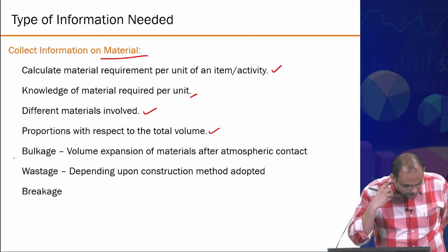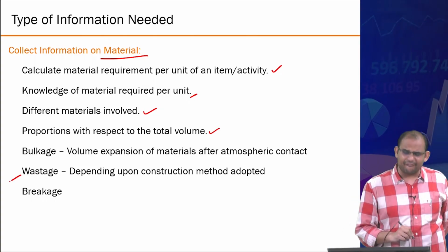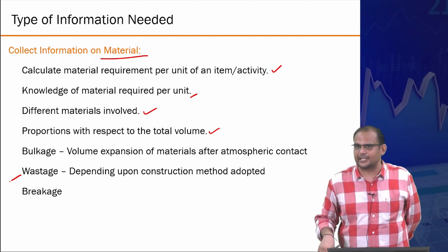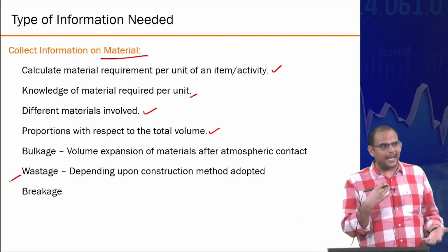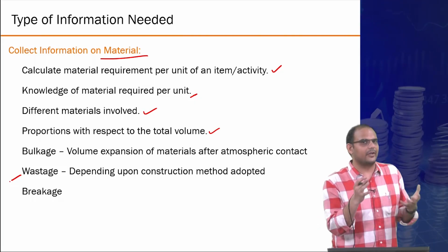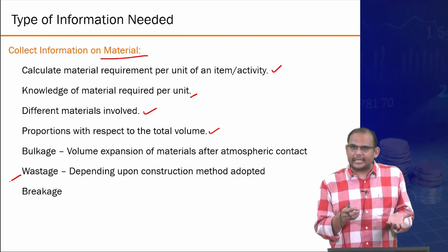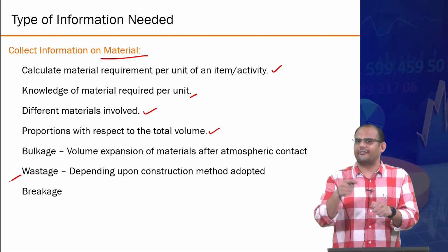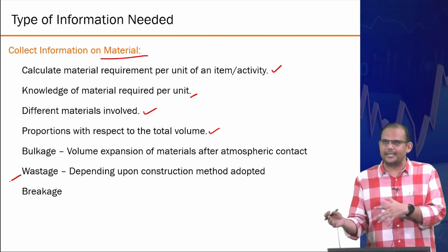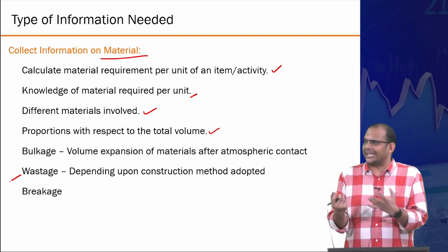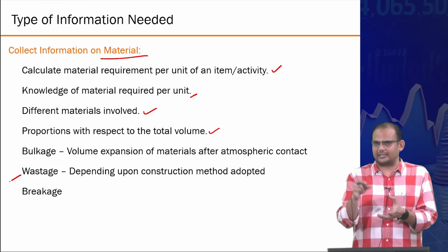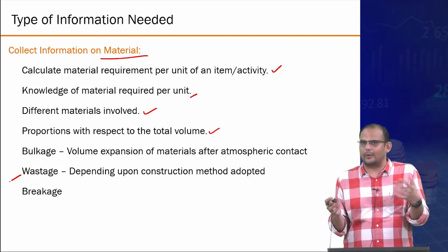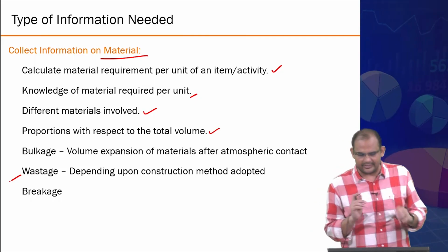There's also a problem of wastage. Not all 100% efficiency in material usage is there, because typically when you're preparing for some sort of transformation, it requires concreting also. You mix raw material, then you add water, but then you are shifting it across so many different equipments. You can't remove the wastage 100%. There will be some concrete which will be stuck to that mixer, and you cannot get it out easily, and so on and so forth, right? So there is always a wastage.